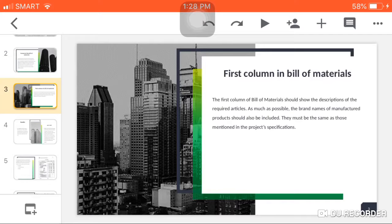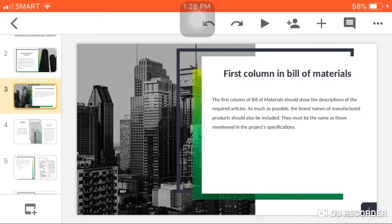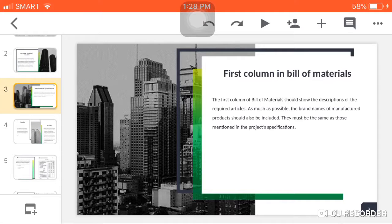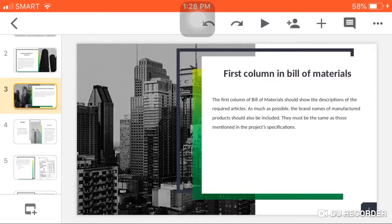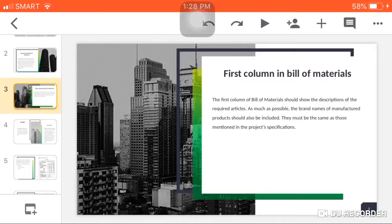What can you see in the first column in the bill of materials? The first column should show the descriptions of the required articles. As much as possible, the brand names of manufactured products should also be included. They must be the same as those mentioned in the project specifications.